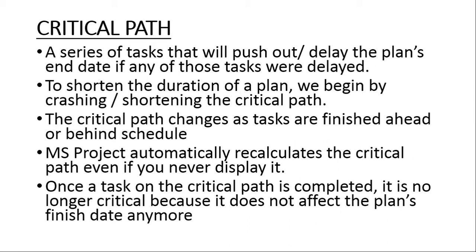Once a task which is on the critical path is completed, that task is no longer critical because it does not affect the plan's finish date anymore. Once we finish that particular task, it can no longer delay the project because it is done.